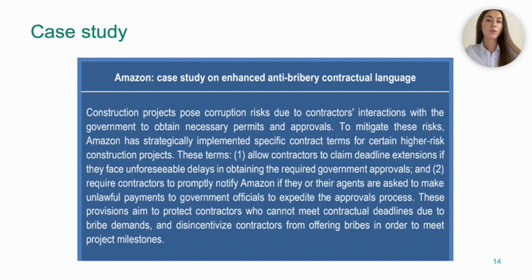Secondly, linking this to Corruption Scheme 2. So when contractors are squeezed with bribe demands and don't have any protection, they often cope by cutting corners. This could be thinner tarmac, weaker concrete, fewer items installed, but invoices still at 100%. By protecting honest contractors who refuse bribes and allowing them more time instead of forcing them to fix the problem with money, these clauses reduce the financial pressure to compensate through poor quality work. So indirectly, they actually lower the risk that we'll later find missing quantities or substandard works under Corruption Scheme 2.